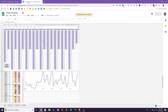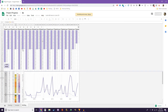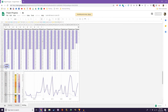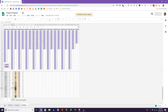This graph is the same idea but for my maternity leave month before the baby came — this is the knitting project I was showing you with the yellow boxes on paper. It's a corner-to-corner crochet blanket where the first row is two stitches long, then three, four, five, six, up to a middle row of 204 stitches. I couldn't just say 'two rows per day' because early rows take a minute while later ones take an hour. So I based progress off stitch count, but with 41,000 stitches I used percentage instead — hence 2% per yellow box on that paper sheet.